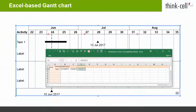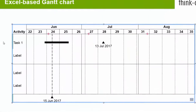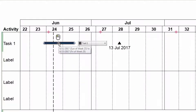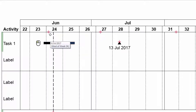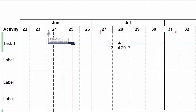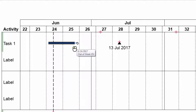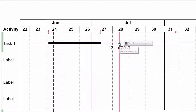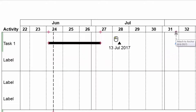After entering the dates into the data sheet and thus creating anchor points in the Gantt, you can now anchor timeline items to them. Drag the handle at the beginning of the bar to the first anchor point. Now drag the handle at the end of the bar to the second anchor point. Finally, anchor the milestone to the third anchor point.